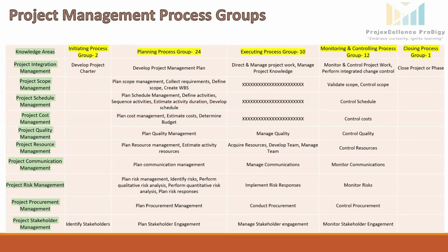Next, conduct procurements. It is the process of getting the goods and services needed for a project. So this includes asking for bids, choosing the best options, and making contracts with the suppliers and vendors. It involves managing these contracts to make sure everything is delivered as promised during negotiation.